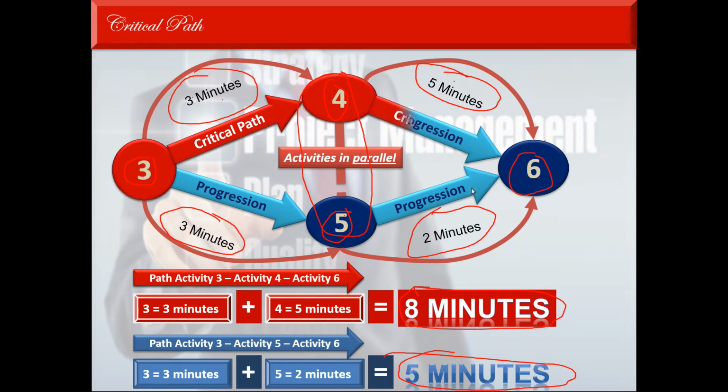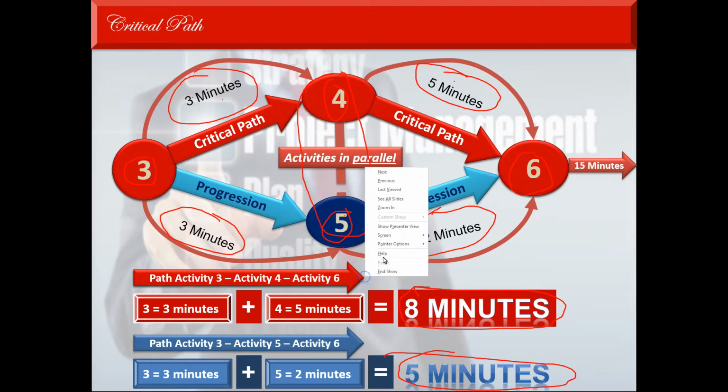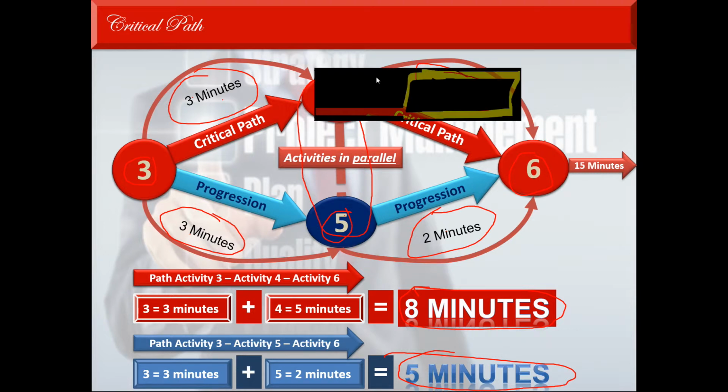With activity 5, you can start it later or you can end it earlier, as long as it is done before the 5 minutes of the activity in which it is in parallel, namely activity 4, has elapsed.